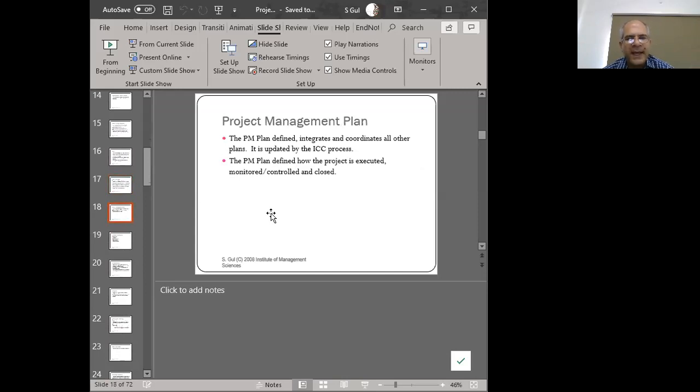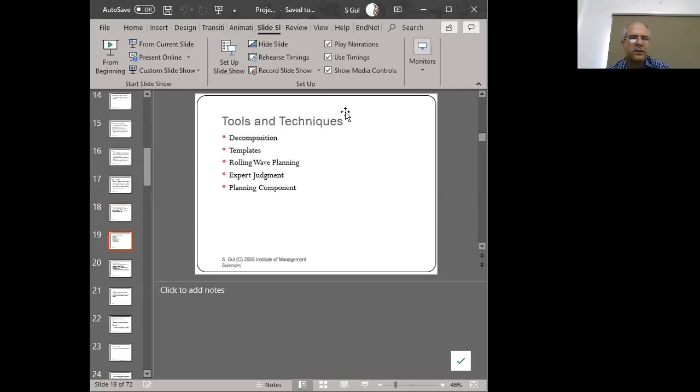Now, the project management plan is always going to be there. And the project management plan is something that doesn't exist from the beginning of the project. Rather, it slowly develops as the planning of the project takes place, right? So you will have concepts from the scope going into the plan, specifically the charter and the WBS. We'll have things from the time knowledge area going into the plan, specifically the remaining part of the WBS with the work packages, the network diagrams, the Gantt charts, etc. You know, any control type of mechanisms, concerns about the integrated change control, concerns about quality, about communications, about stakeholder management, about risk, etc. So all these things combine together to form your project management plan. And once the plan is completed, then normally we go into the idea of execution. So the project management plan is also being built and we're adding to that, right?